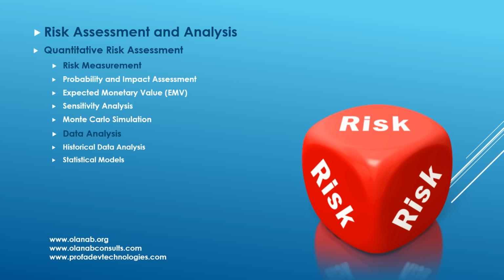Now we delve into the meaning and the various subcategories of both quantitative and qualitative risk assessment methods. Quantitative risk assessment can be further classified into two: risk measurement and data analysis. Risk measurement can be further classified into four: probability and impact assessment, expected monetary value (EMV), sensitivity analysis, and Monte Carlo simulation.